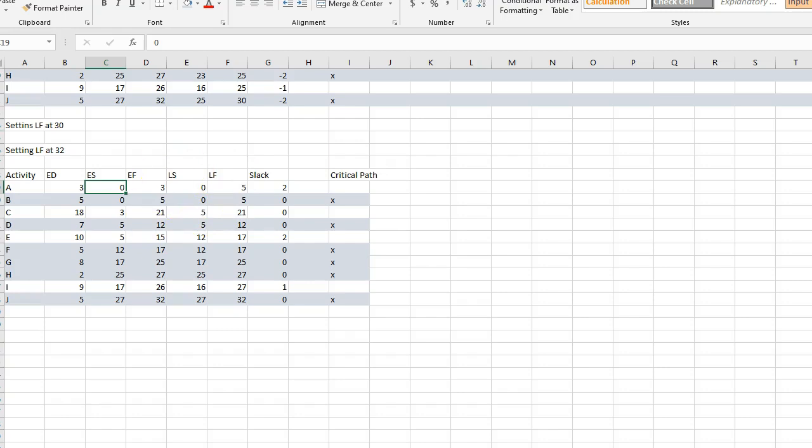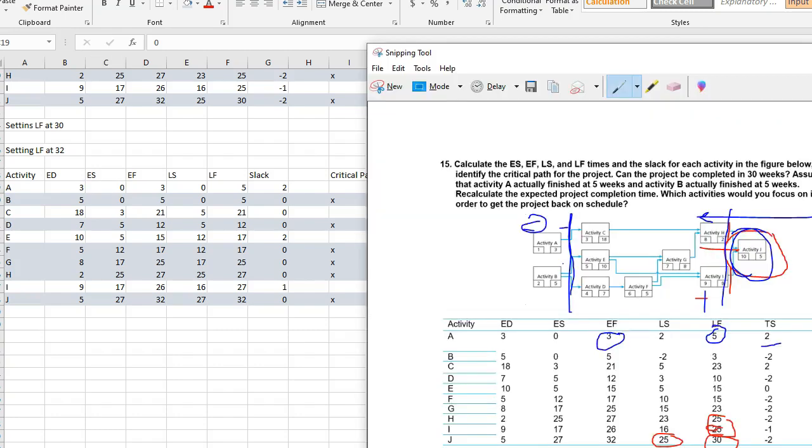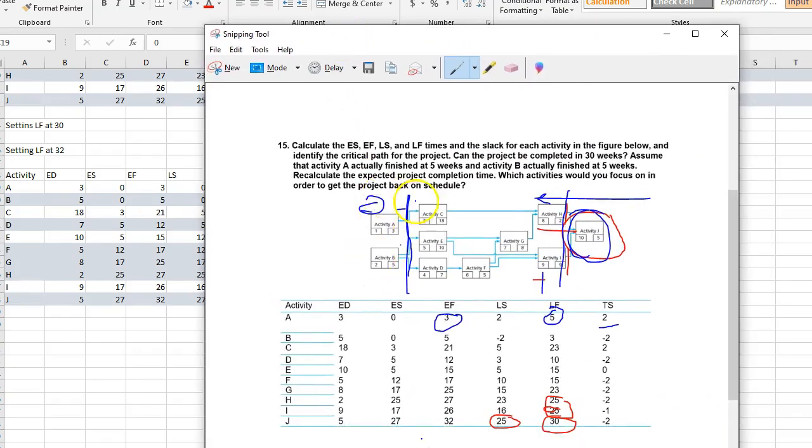So we can give you some more examples. There's lots and lots of tutorials that wander off. Maybe just doing it this way where we do it by hand and looking at this chart. You really do need to be able to have this chart ahead of you so you can see where those activities land and their predecessors. So it might not even be a bad idea to build a chart and say, these are my predecessors. So we know that activity C is dependent on activity A, that activity H is dependent on activity C and activity G. That way we can also stagger that out.